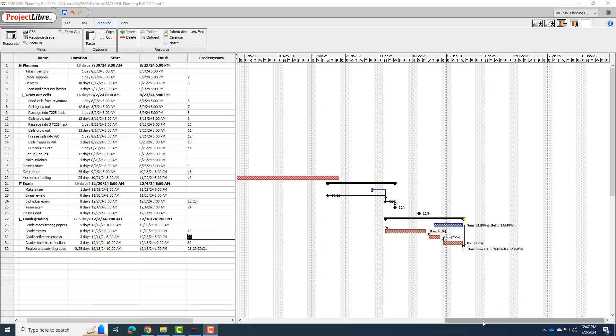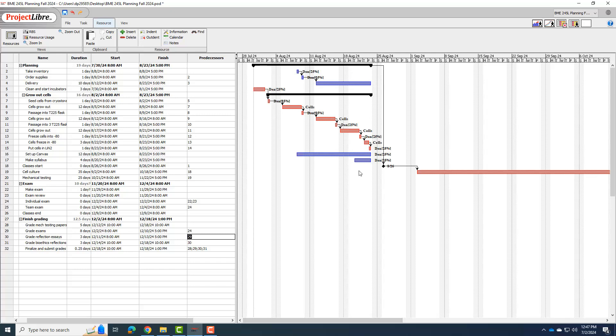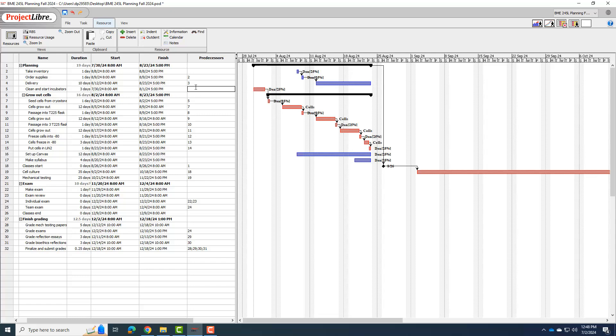Okay, the other parts of this project plan that were very overlapped were the cell culture tasks. I have a lot going on simultaneously. I do have a lot of successor tasks in here, but there are still places where I'm getting over scheduled, especially with this canvas and syllabus parts. So maybe I can again add some predecessors where I don't really need them, but they help me plan for when I actually need to be doing the work. And so I can see some parallel things I can fix. For one, I can just make order supplies as a predecessor for cleaning to start the incubators. So I'm going to go to clean and start the incubators and say, I need to order supplies before that.